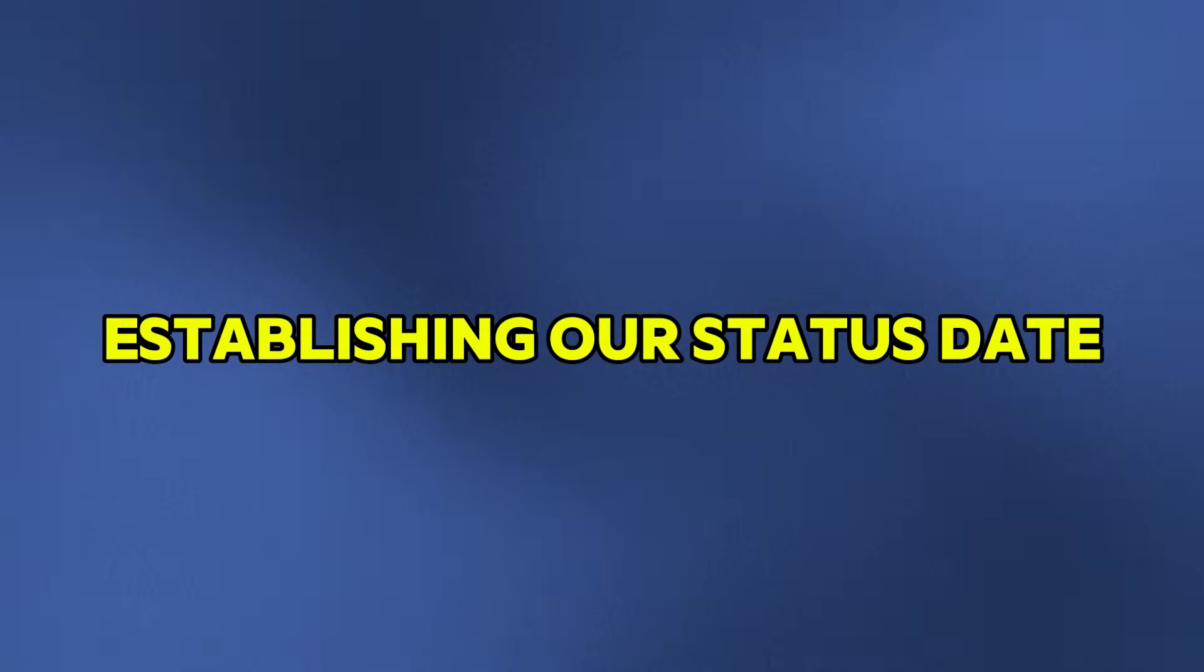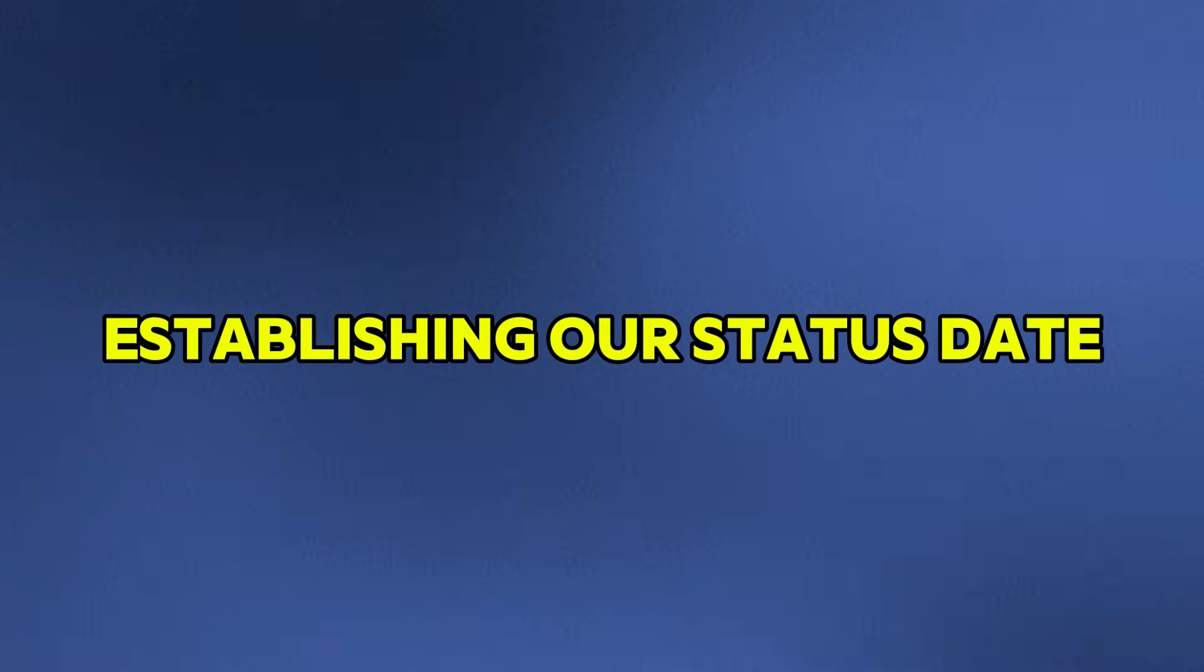Now step two is to create your status date, which we'll be using to update your project's progress.